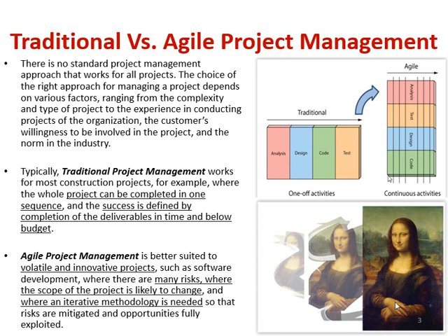If you talk about the traditional approach, you see in the picture which I have provided in the slide on the top right corner that in traditional we have all the phases in sequence. That is analysis phase, then design, then coding and test. What it means is that you start the design phase only when the analysis is completed, and similarly the coding will start once the design is completed, and finally the testing can start only when the coding is completed. So this is the traditional approach.